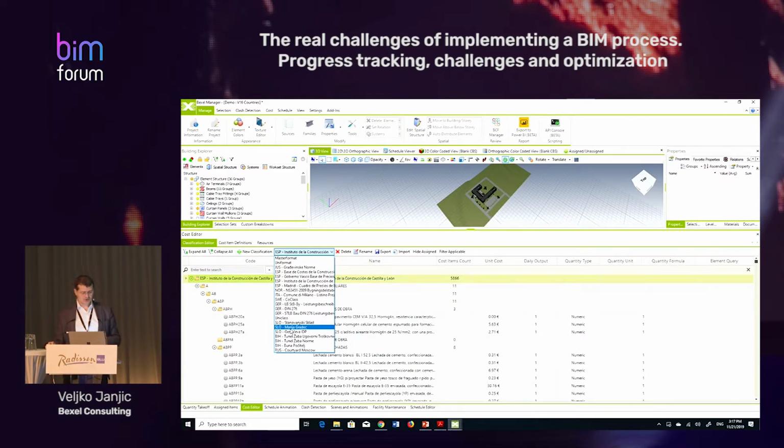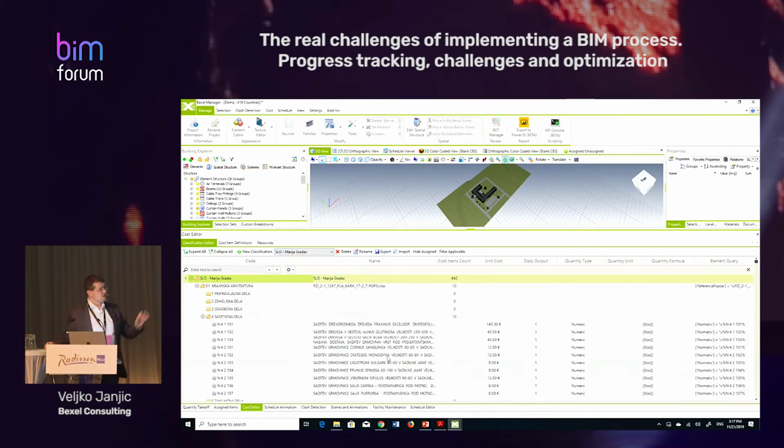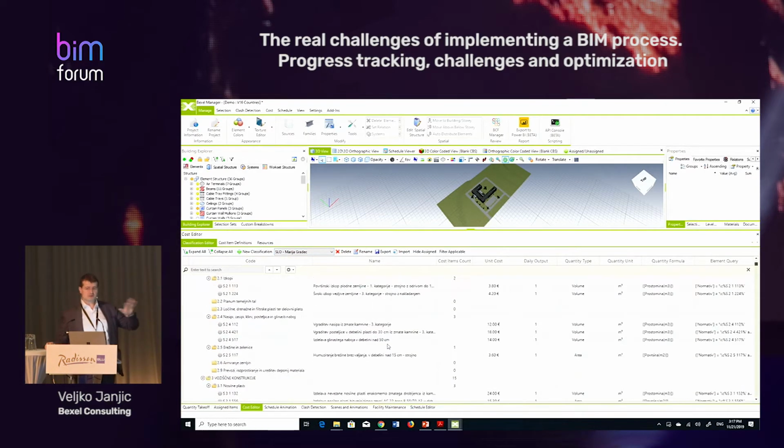So in this project, this is a Slovenia national standard for infrastructure projects. And it's, to be honest, very good. What we put here in a BIM execution plan, that is relationship between software and the process. We defined that every element must have at least one property which is called normative. It's in Slovenia like assembly code. And it could have one or the group of the elements.